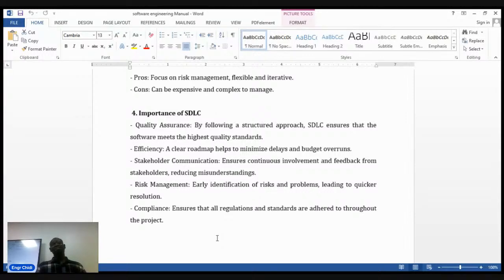Budget, you have to consider it before you start. You do the analysis, you collect all the requirements, and then you do a design to show you understand it, and you take that design to the owner. Auntie Bola, is this what you want me to do for you? She says yes. Sign. She signs. You now come back, because there's a problem with software development. Somebody will tell you they want a software that will lift this thing up. You build it, and when you present, they say they want the one that will lift it up and put it somewhere else. But that's not what you told me from the beginning. It happens all the time.